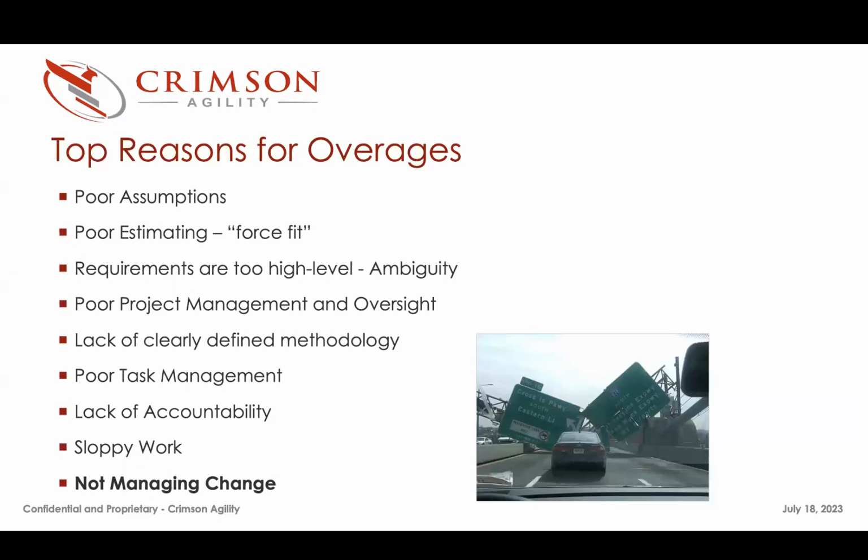Maybe it took us more time to get access to their data. Maybe it took more time to extract it than we thought. But that part of the methodology as it relates to the data migration needs to be well managed. If we say we have 40 and it takes us 20 to do that first part, we're going to always be running behind. And then later in the project, we're going to be looking for more time to complete the data. So some of the areas where there should be a clearly defined methodology are on data. Here's the 40 hours, here's how we're going to use that. Here's what we need you to do. Here's what you're responsible for. Here's what we're responsible for. And make sure that the client has clear expectations as it relates to the data.